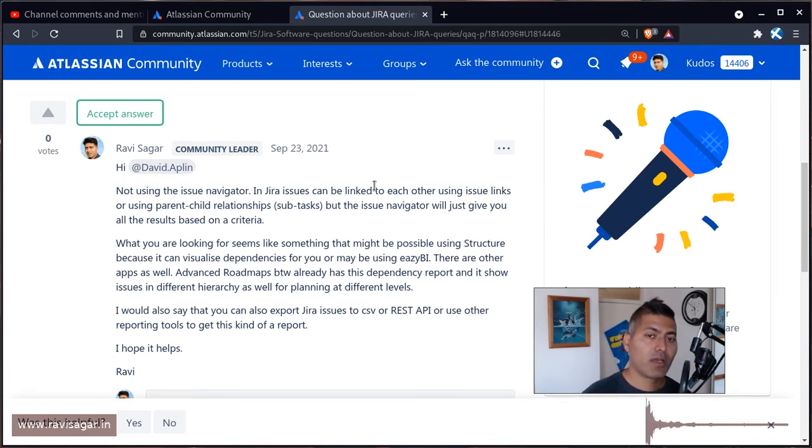Structure Board will let you create this hierarchy following a top down or bottom up flow. When you have this hierarchy, you can, for example, start with the idea, expand it to feature, and then to epic, stories and tasks. So you can have that view. And this is really wonderful, because you can also see what is happening at different levels.